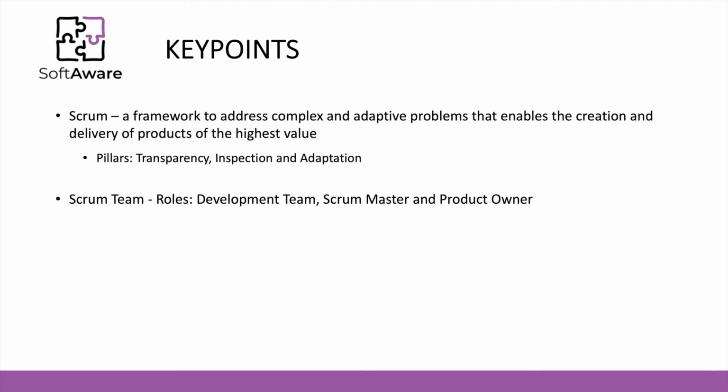Each role has specific goals and has to comply with some of the major ambivalence that needs to be addressed inside of the Scrum framework. So, for instance, as a Scrum Master, you shouldn't also be a member of the development team, nor the product owner. Each specific role should be focused on their goal.